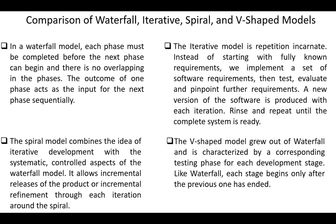In a waterfall model, each phase must be completed before the next phase can begin and there is no overlapping in the phases. The outcome of one phase acts as the input for the next phase sequentially.